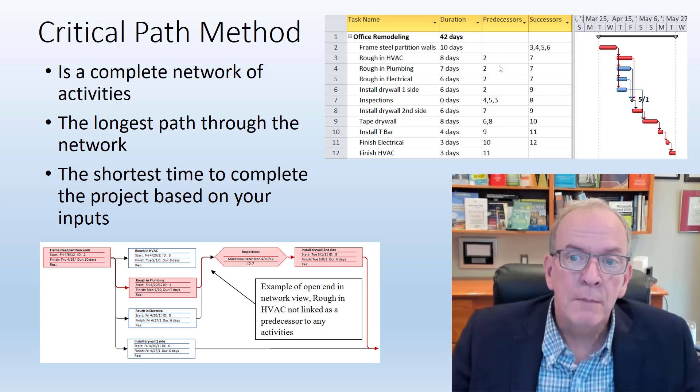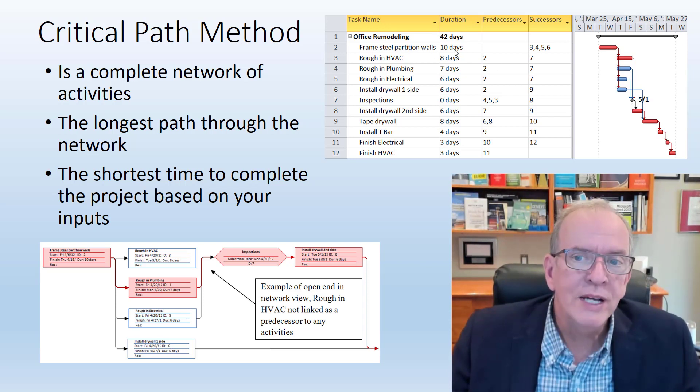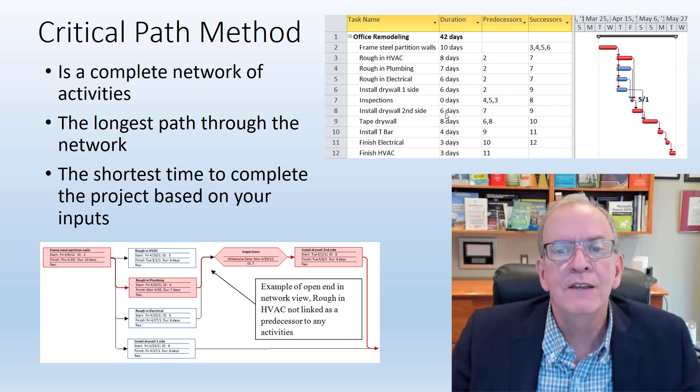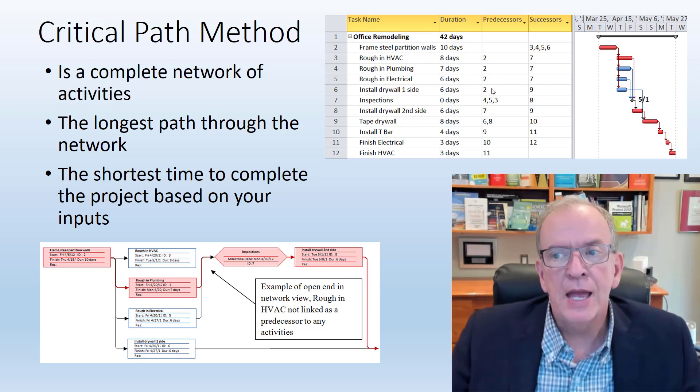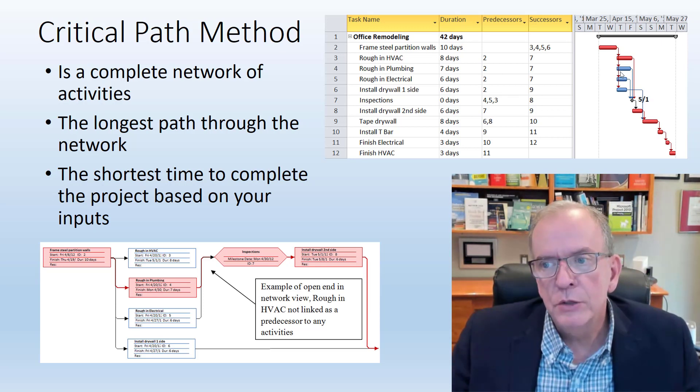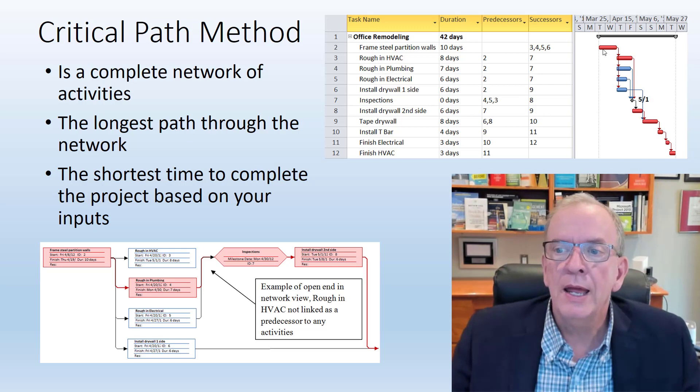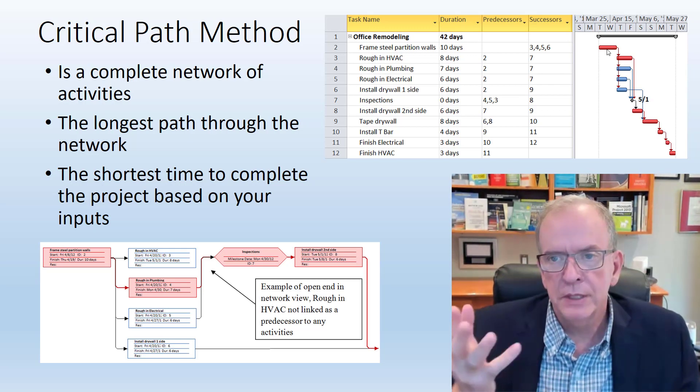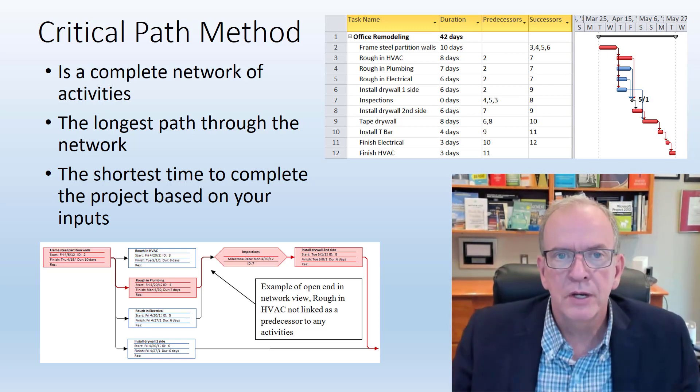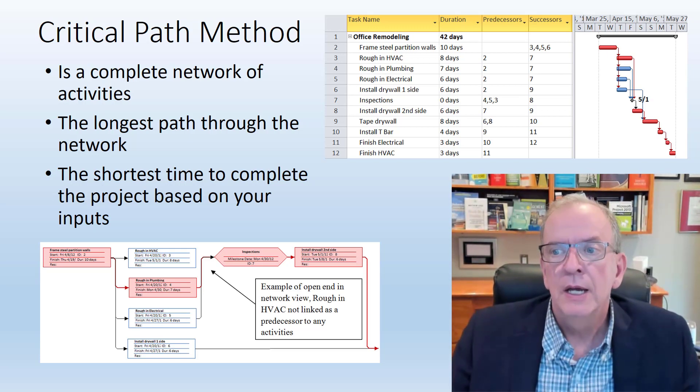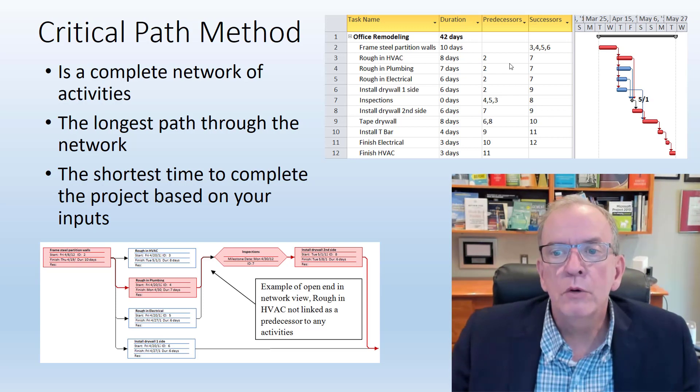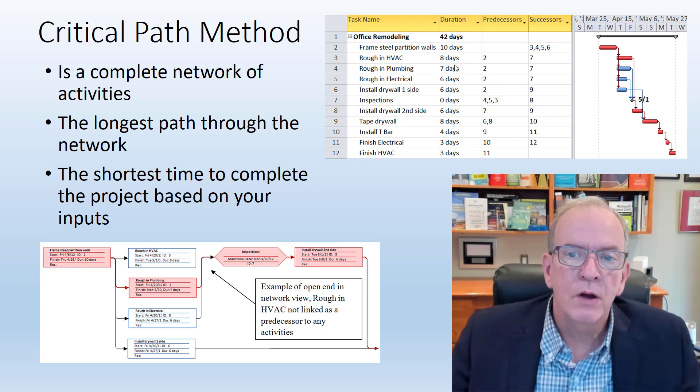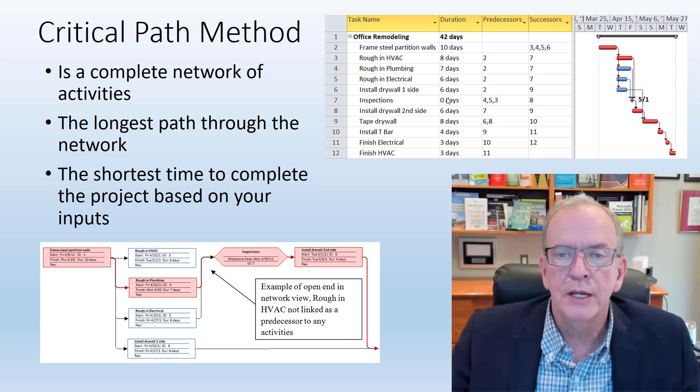It makes you come up with what you expect the durations to be for these activities and you put them into a network. If you're using a software program, this example is with Microsoft Project, it will calculate the actual start and finish dates based on the durations you put in.